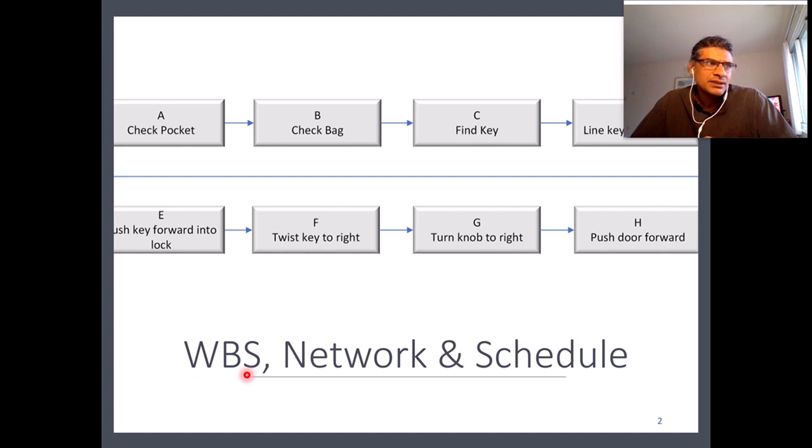So what does WBS mean? As I mentioned yesterday, or in the earlier video, the work breakdown structure is the decomposing of the project into manageable tasks, called task decomposition, and that's represented in a structure diagram called a WBS. Those WBS do not show relationships; the relationships are represented in a network form, where you show the relationship between different activities. We'll talk about the schedule on the next slide, but the fundamental principle here is how we represent a task and how we represent the relationship between the tasks.